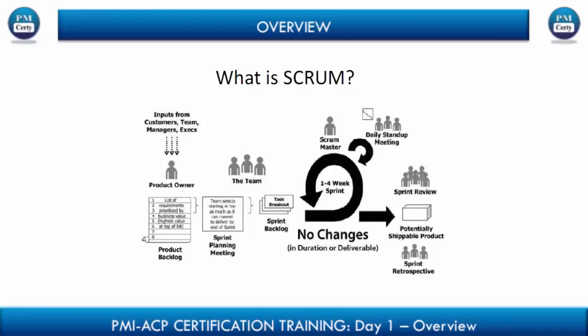So the next piece we go to is a weekly review. Important that some time is set apart every Friday or Monday, whichever is considered the period, when there is a short review done, either ideally with the customer, if not with the customer representative, at least the product owner, so that some tangible progress is being made, acceptance is being understood, or a lack of acceptance, so that there's a course correction. This is called a sprint review. At the end of it, as I said, a working piece of software, typically called a PSI or potentially shippable increment, must be provided.